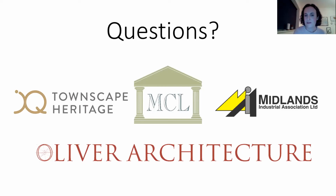Josie's asking, and this is a question for both of you to answer, what was the biggest challenge of this project? The turrets. Yeah, turrets, definitely turrets. Yeah. Without a shadow of a doubt. Also, scheduling up all the repairs. That was quite time-consuming. It was quite a long period to go through each elevation. So we tried to do it in sections, lift by lift, and then there were lots of different additions. So about 4 revisions we did in total for all the elevations. Right. Okay. Josie says the turrets were worth all the effort. Thank you. I'm glad she likes them.